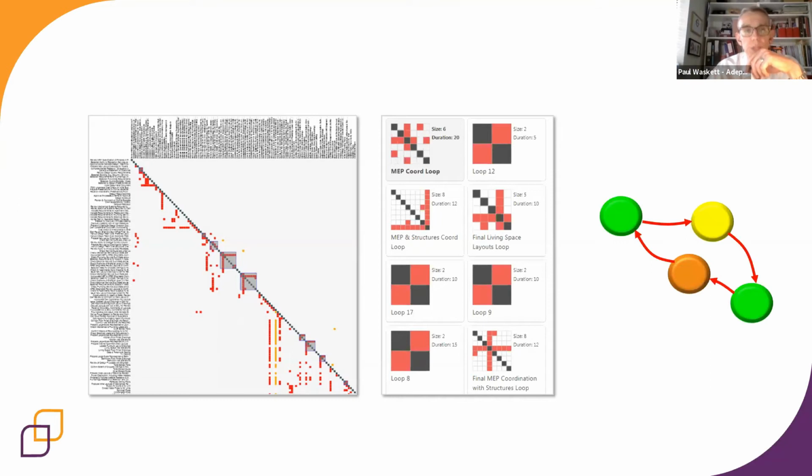Now, when we come to plan these activities, these clusters, I'm referring to them as iterative. Now, what we don't want to do is plan a process that goes 1, 2, 3, 4, 1, 2, 3, 4, 1, 2, 3, 4, 3 iterations of 4 activities, because that's long-winded. That turns that into a long-winded process. What we want to plan is 1 and 2 and 3 and 4. Those 4 activities being undertaken concurrently through collaborative working between the parties involved.